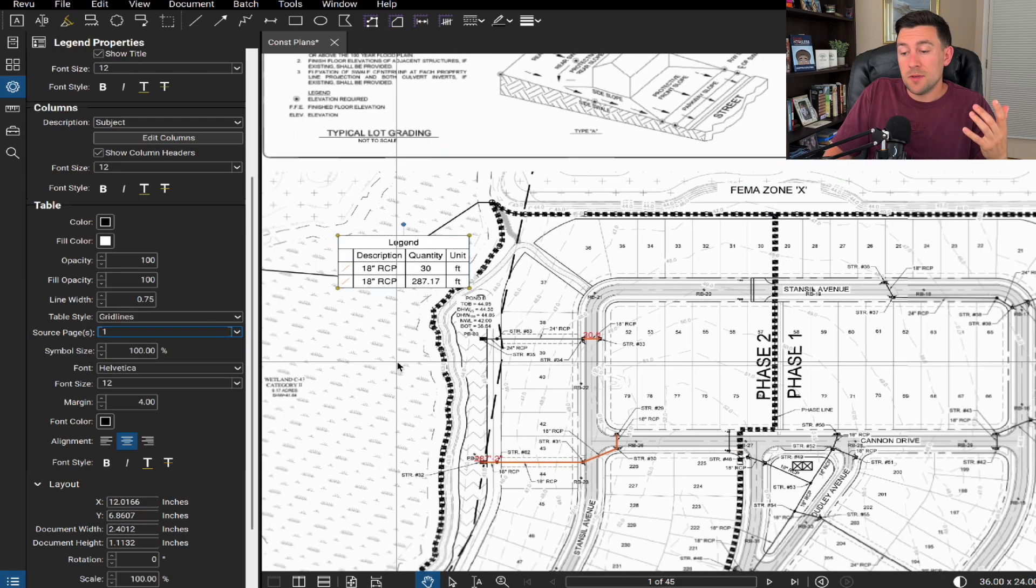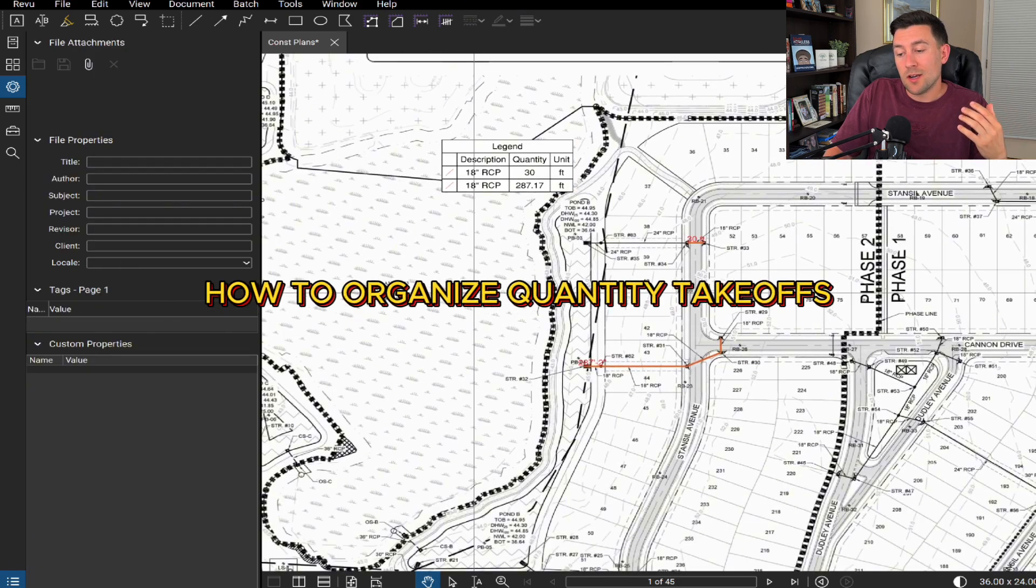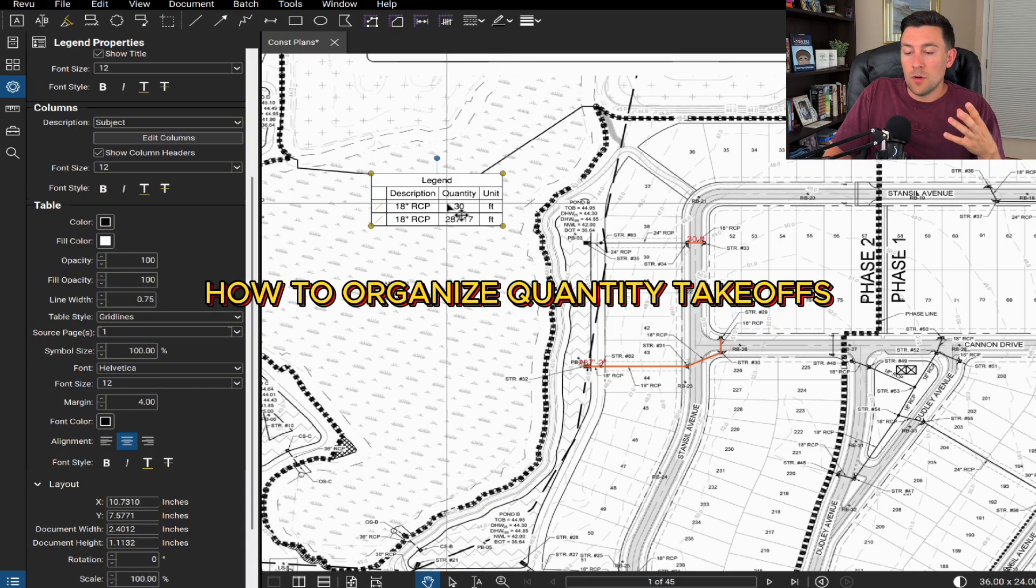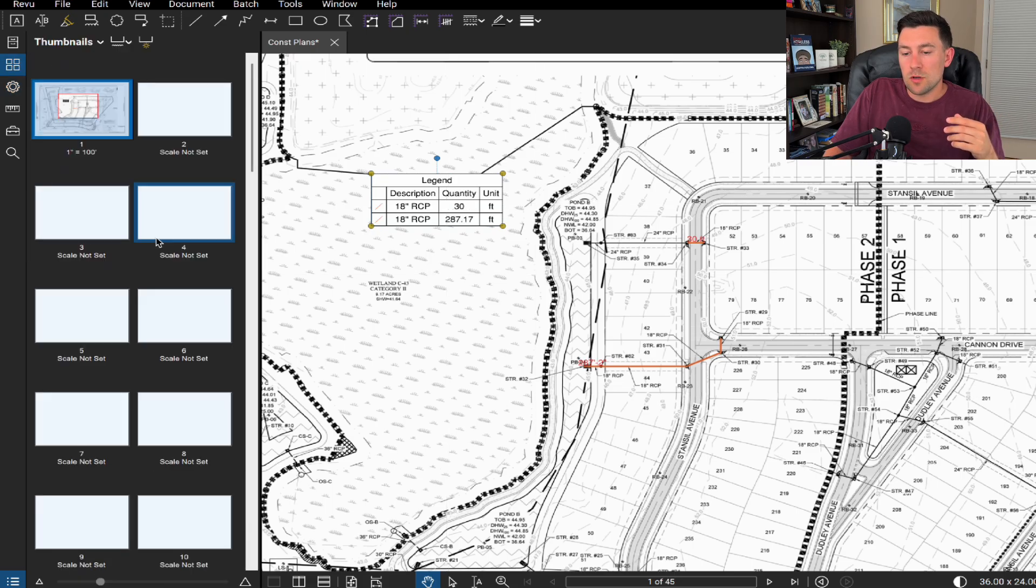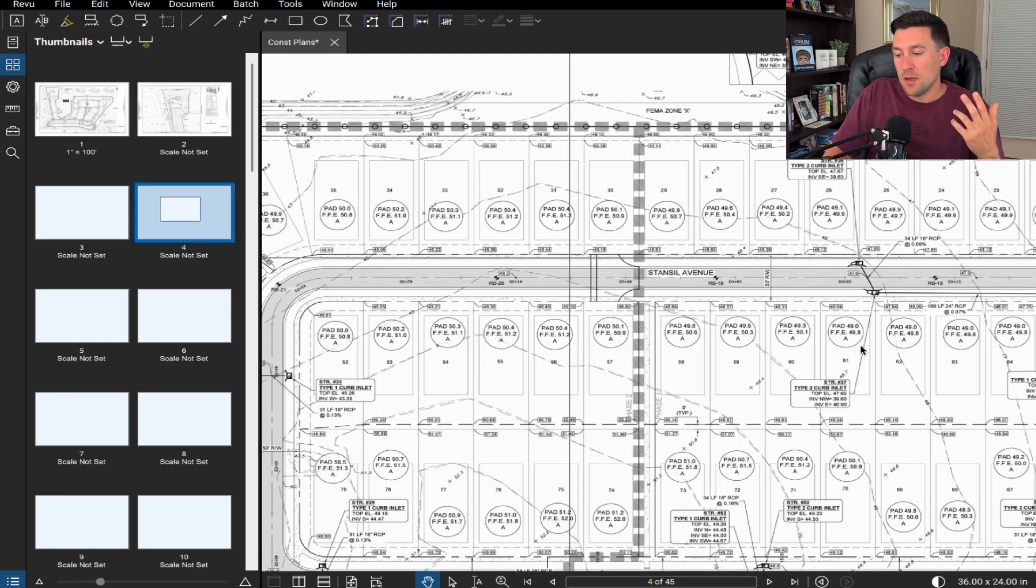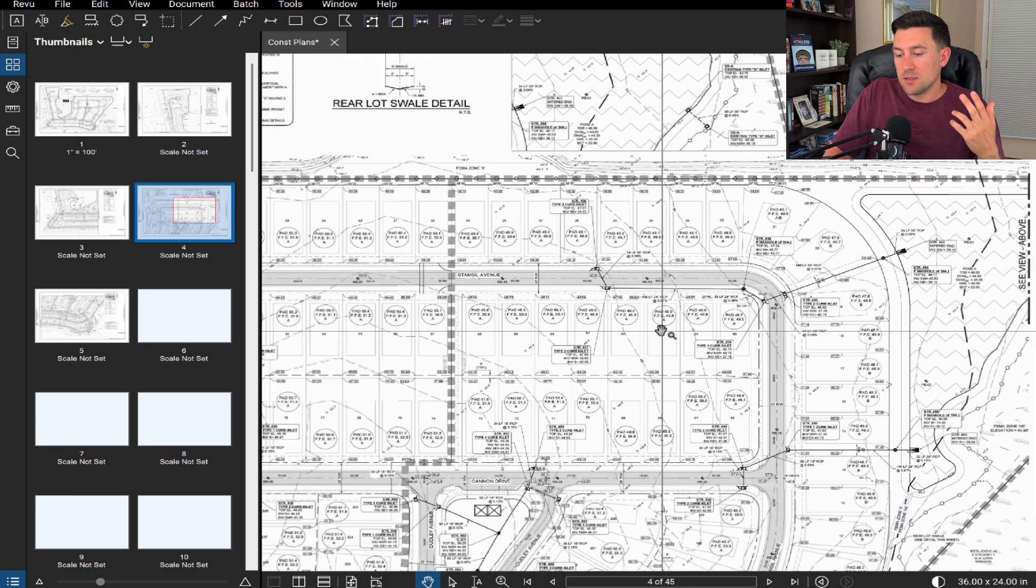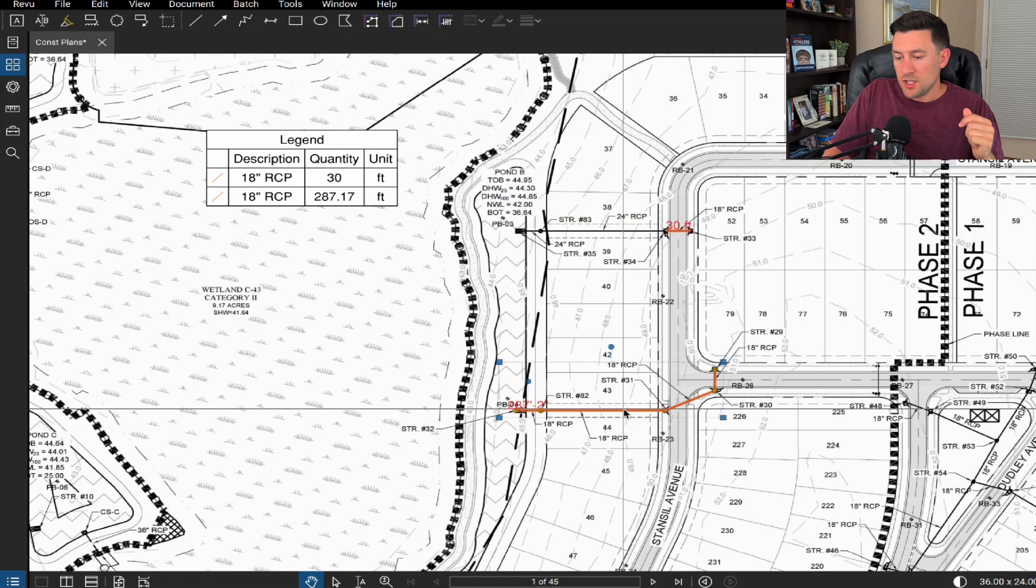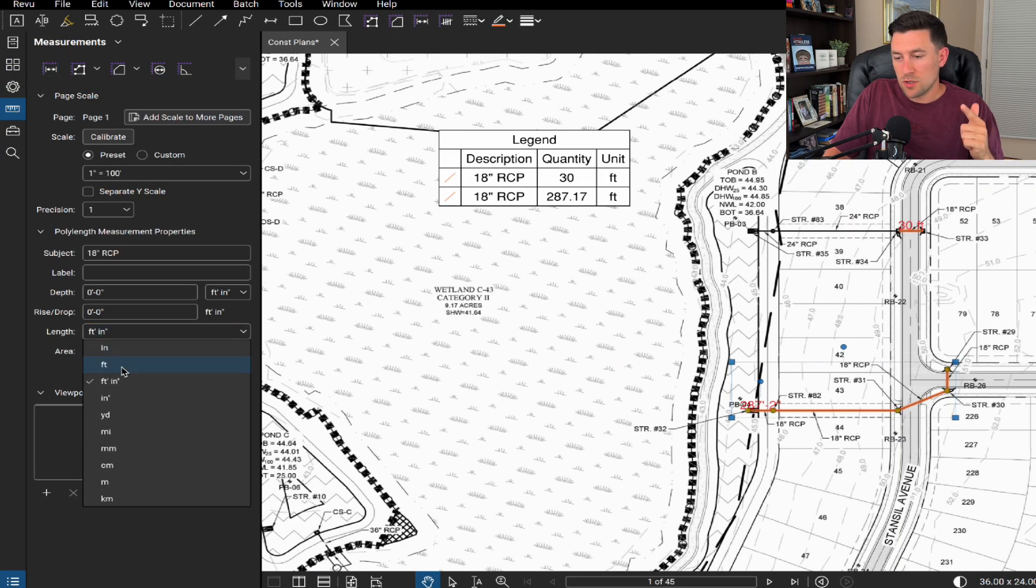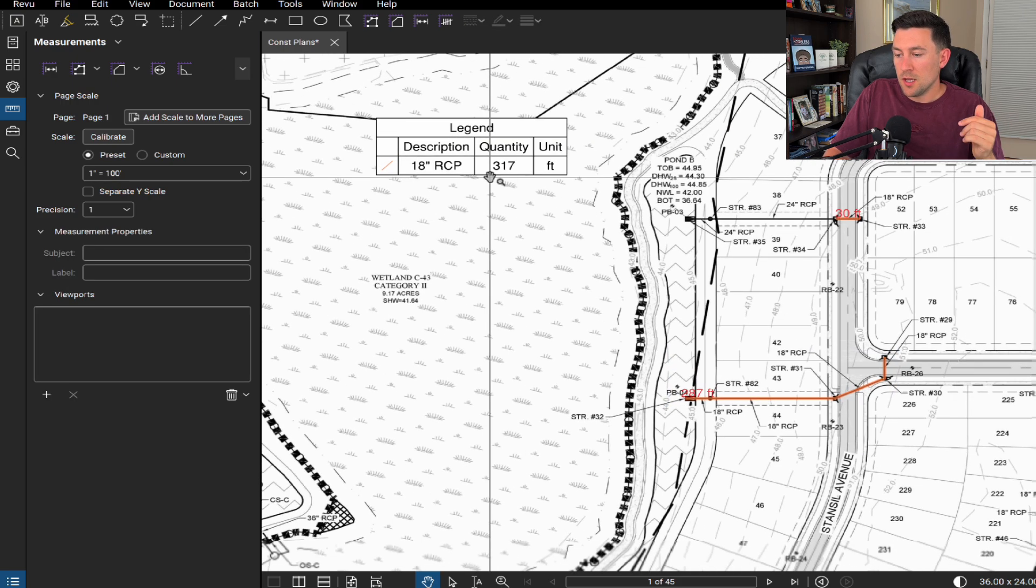Since you guys are here to learn tidbits of how I would organize quantity takeoffs, what I would do is I would have one full page of your quantity takeoffs just for that one page. And then maybe on the cover sheet, you can do your total quantities. Because this becomes important once you do individual sheets. I happen to be on a master plan. But let's say if you were to go to these each individual sheets here, you would probably just want all the quantities on that one page. All right, so let me change this back. And let's see if our table updates. So let's go to this measurements again, I'm going to go to feet and let's watch our table update. Perfect. So you see how that legend updated. So this is how I want things to look.